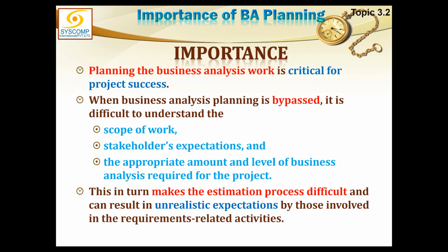When business analysis planning is bypassed, it is difficult to understand the scope of the work, the stakeholder expectations, and the appropriate amount and level of business analysis required for the project. This does not mean the project cannot happen. The project can still happen, but there are some difficulties we are going to face. The scope will not be amply clear. Stakeholder expectations will not be gathered properly. So all the load of this work will then fall on the project manager's shoulders.